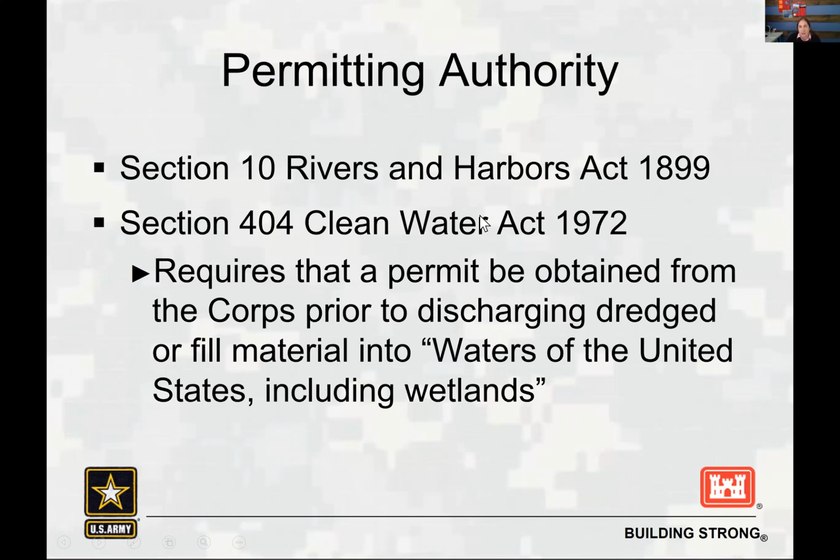And what does that mean? It just basically means that under Section 404 of the Clean Water Act, a permit is required from the Corps of Engineers for the discharge of fill material in waters of the United States, and that includes wetlands. What is fill material? Fill material is anything that you would put in the water, including sediment, rocks, concrete, anything like that, would require review from us.